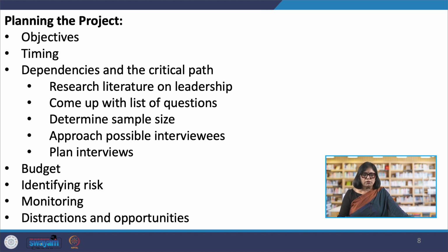Generally speaking, the shorter the time scale of any project, the easier it is to plan, and research is no different. Thus, when planning a PhD, it may be better to plan at a fairly top level, looking at the main stages: narrowing down the topic, putting in the proposal, carrying out the literature review, deciding on the research methodology, then planning the various stages in detail once you have got there. The outcome of each stage is likely to dictate the shape of the next one.